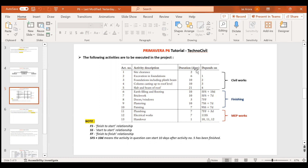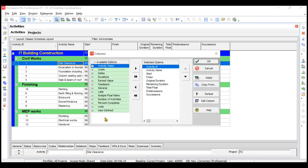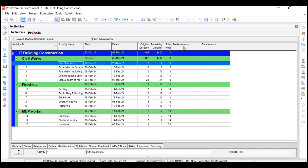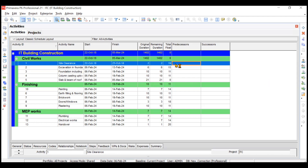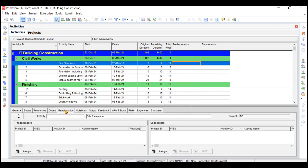Now we will go to Primavera software and assign these relationships. These activities have already been created. To assign a relationship, you can either create predecessor and successor columns by going to the customize option in columns and adding those columns. That is one method — you can choose your predecessor or successor by clicking there. Another method is to click on the activity and go to the commands bar for predecessor and successor options. I prefer the third method, which is the detailed tab. You can assign the predecessor and successor there as well.